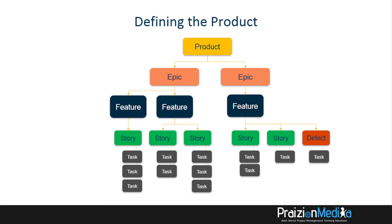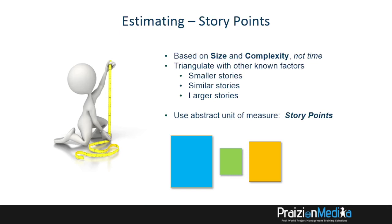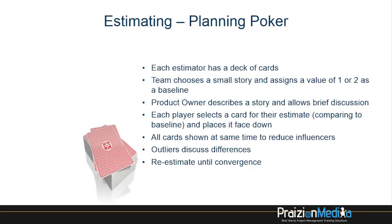Under that, some teams actually decide to get to the task level, but this is not a level we dwell on in the world of Agile on a lot of teams. The way we estimate our work is different — we do not estimate our work in durations. We use other measures when we are estimating stories. The way we estimate stories in the world of Agile uses a couple of methods. First of all, we use story points. Story points are not based on duration; they're based on size and complexity. A lot of teams will use planning poker. Each estimator has a deck of cards, the team chooses a small story and assigns a value.